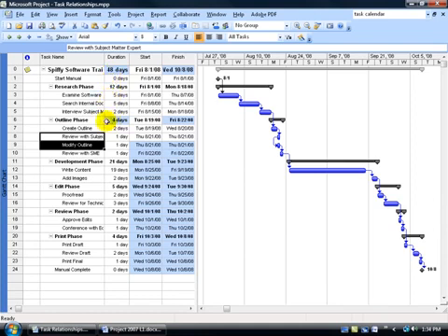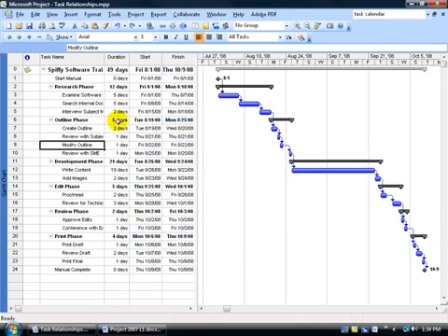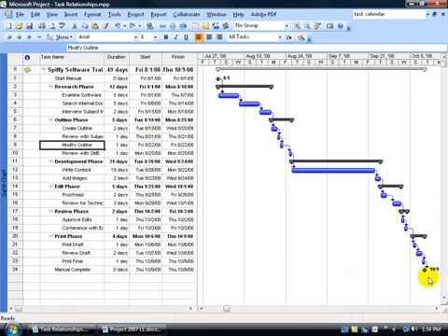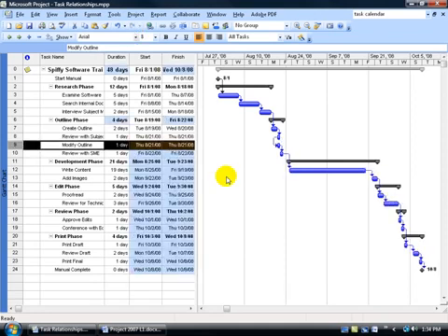So that makes sense. Also keep in mind, not only is the duration of the project shortened by 1 day, but also the summary task for the outline phase is going to be shortened. Well, what was it before? If I haven't clicked save, I can hit the undo button. You can see it was originally 5 days. When I go ahead and redo and change that relationship between the two tasks from a finish to start to start to start, then it goes down 1 day, 4 days. You can also do the same thing and see how it affects the project's end date, which is October the 8th. Again, undo. It was October the 9th, but since these are going to be starting at the same time, it's now October the 8th.